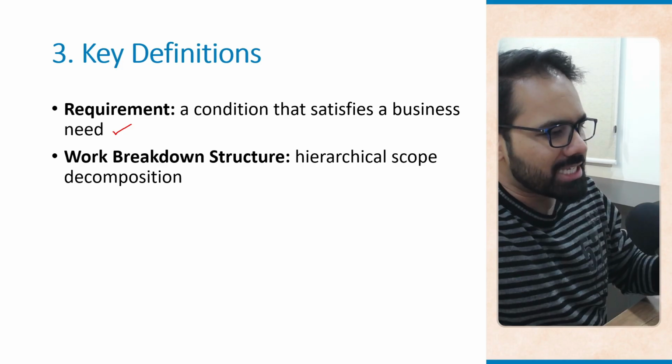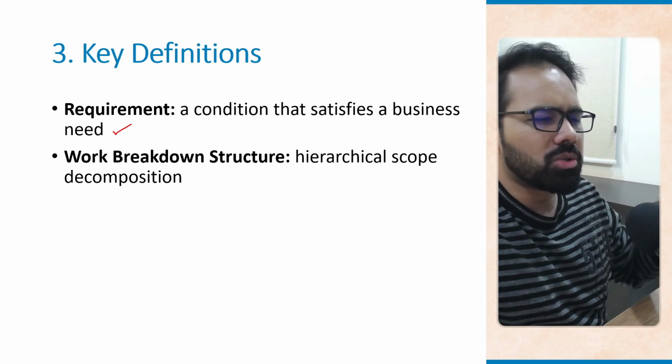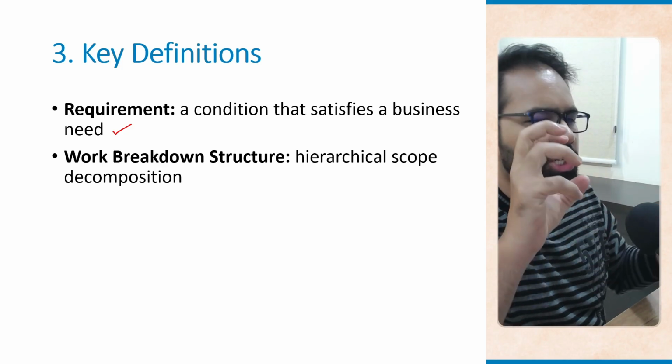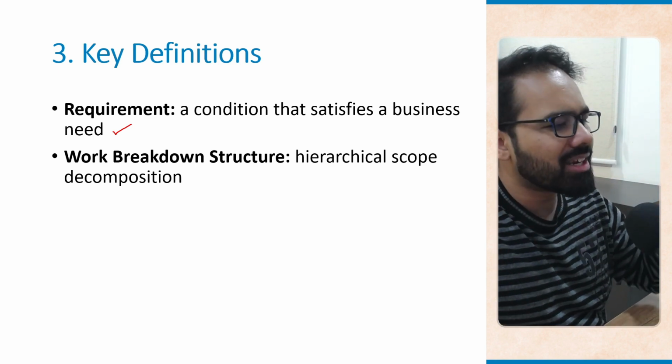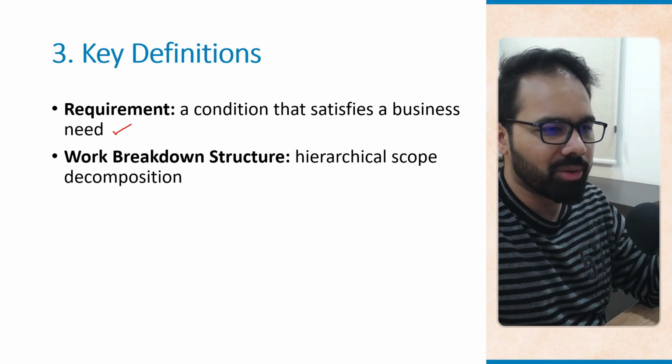The WBS helps break the website into modules like homepage, catalog, cart, payments, backend integration, right? So these are the different modules of the website.